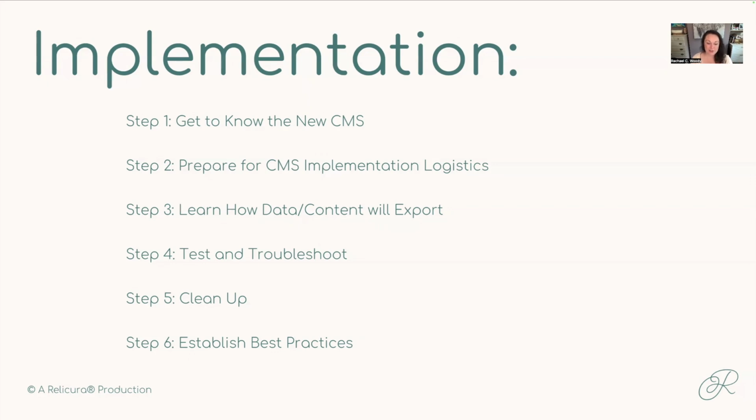Step 4, there will be testing and troubleshooting, of course, especially when it comes to data migration. The last thing you want is to lose half of the data because it didn't make it in there, or it makes it in there but not in the right place. Step 5, any sort of cleanup. All of us have data and past practices that could use some sort of cleanup, and usually this migration to a new CMS is where that comes to light and becomes a priority.